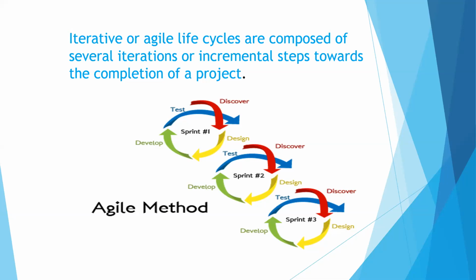should be predictable in such a way that if you are delivering 10 stories in sprint 1, maybe 12 stories in sprint 2, 8 stories in sprint 3, and maybe 13 in sprint 4, then you can now adjust. Maybe this team can only deliver, let's say, 9 or 10, and based on that the whole delivery can forecast the team capacity.